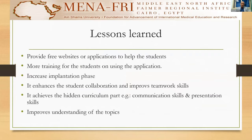Our lessons learned include the need to provide free websites for applications to help students, as some found it difficult to access the application sites for story material. More training for students when using the application is also needed, as some had difficulty while others caught on quickly. Increasing the duration of the implementation phase is also recommended for the same reasons.